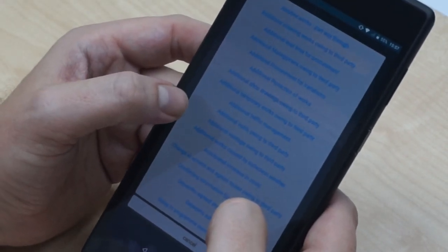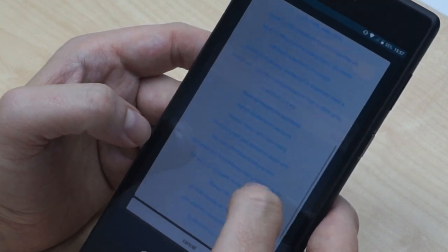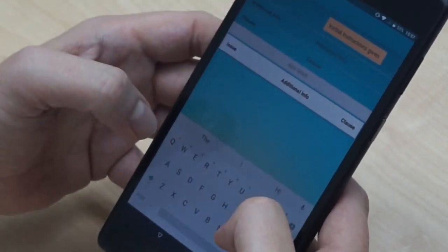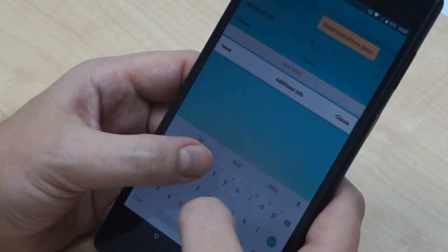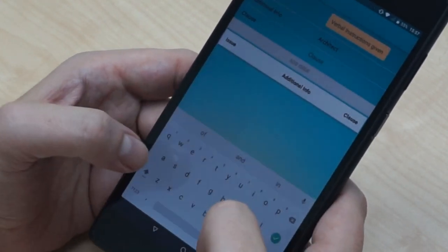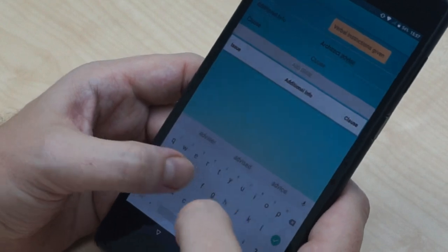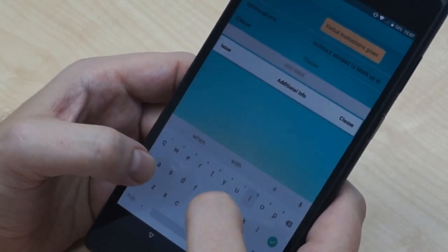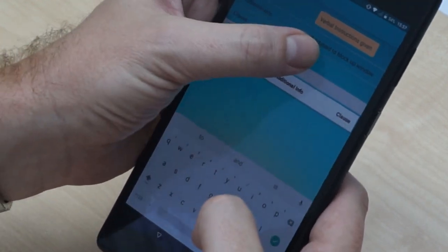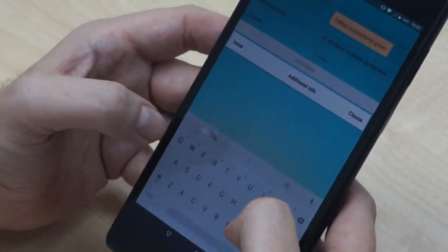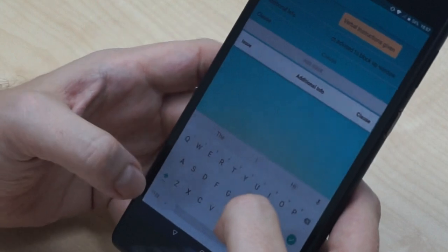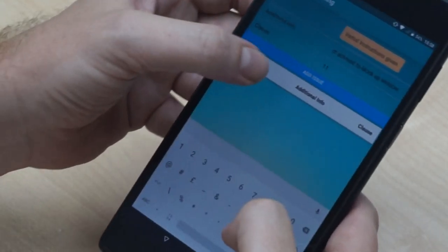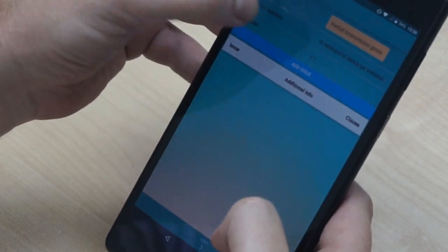The architect came to site, he gave us a verbal instruction. So we find verbal instruction. Additional information: architect advised to block up window. Clause will be the variation clause, but varies from contract to contract. We can just put 11 as an example for this, and then we add the issue.